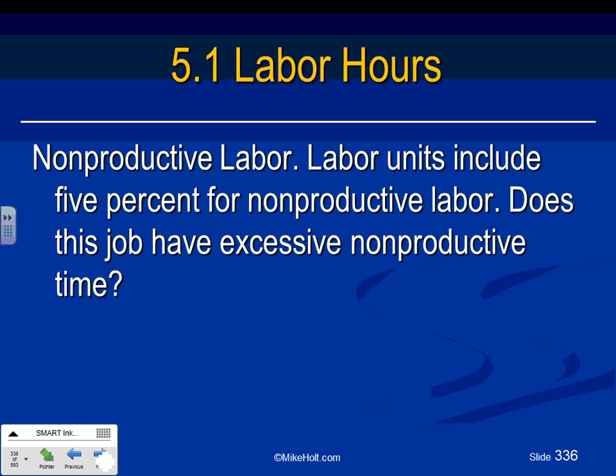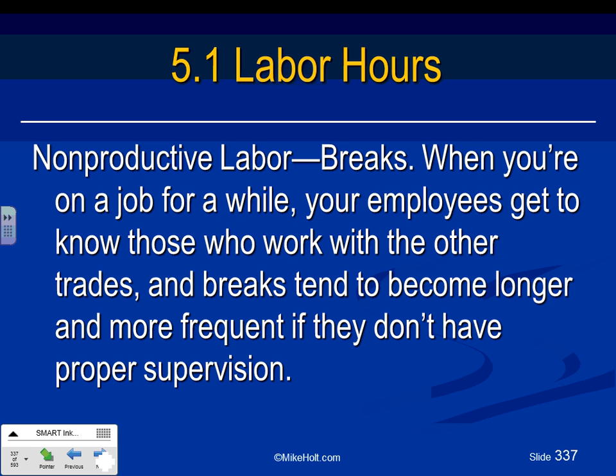Non-productive time. It says 5% for non-productive time, guys. That's the people talking, we're human beings. We like to talk about grandmas and grandpas and other stuff. So you have to accommodate for that one. Non-productive time.